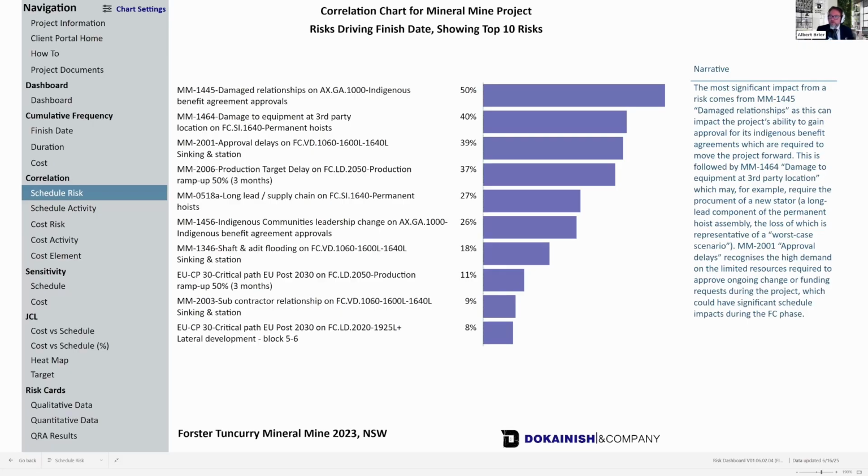If you are following best practice for your risk analyses, then you are periodically updating the inputs into Safran Risk in order to see how those outputs compare to your last set of outputs. You maybe don't have to do a full redo of the model, but you do have to do something, because actuals have occurred, new risks have materialized. Maybe you've got some more on your risk register.